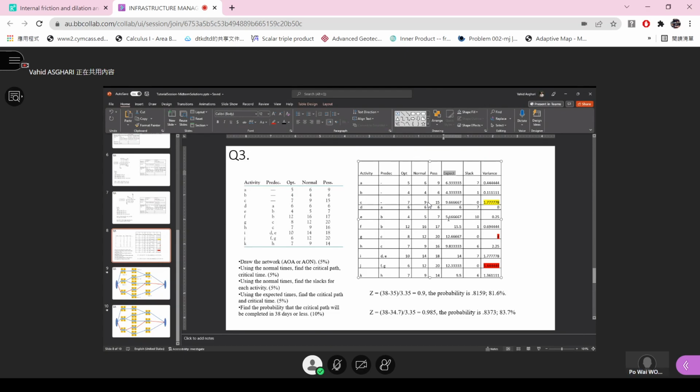Yes, that equation is based on the assumption that these estimates were made at the 95% level. So if the question states that the time estimates were made at the 95% level, it means that you can use those equations. That's it. There is no other purpose for this information in the question.